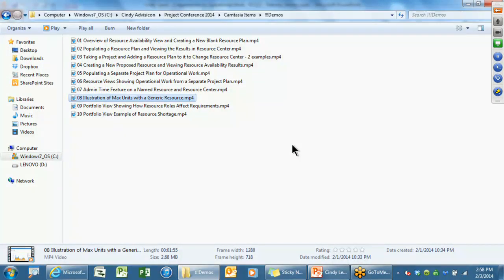So there's a couple issues, some good and some bad, with this. What I found out is the resource plan is not going to be your friend. The leveling feature and resource plan just don't work together. But if you do a master project, or temporarily consolidate them into a master, you could do leveling using a separate project. But here's the problem, and I've got a customer right now, they actually manufacture construction projects.